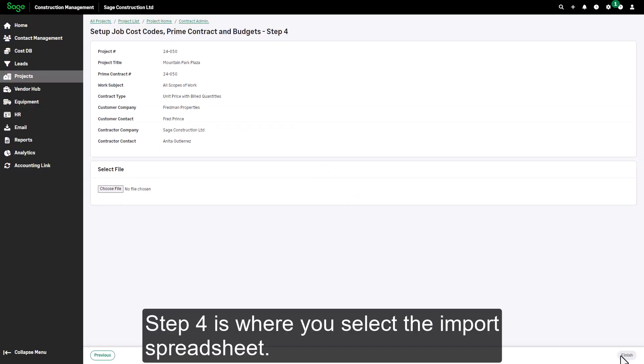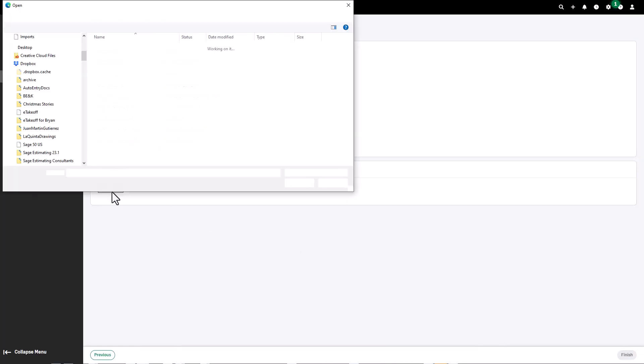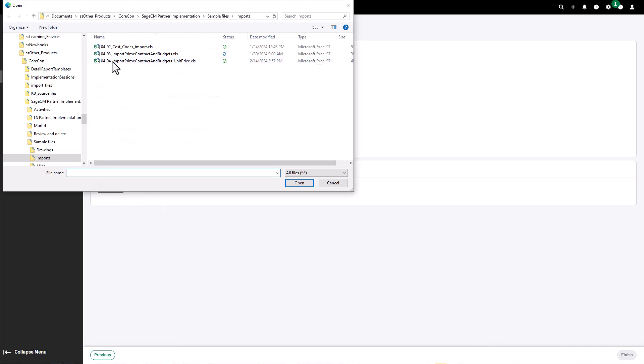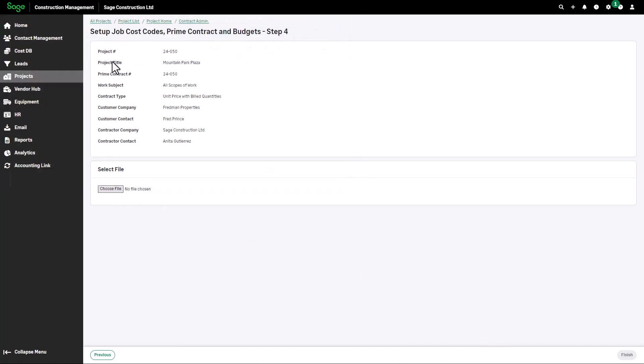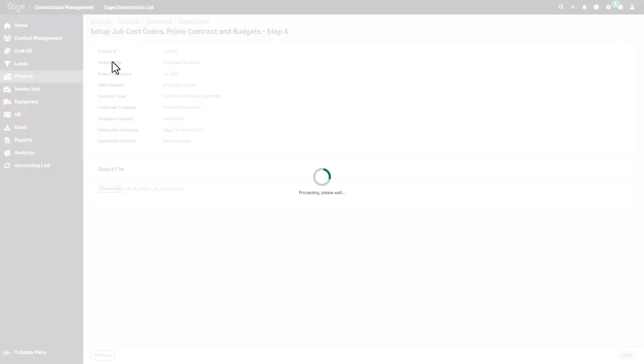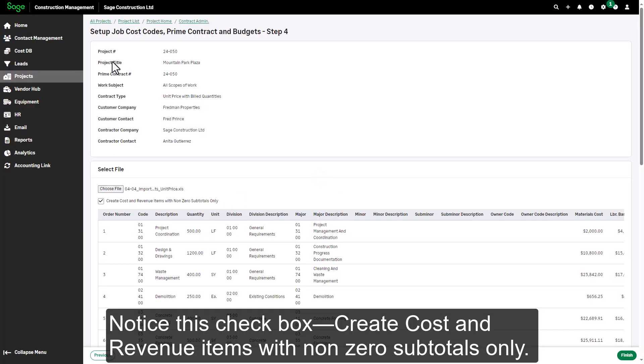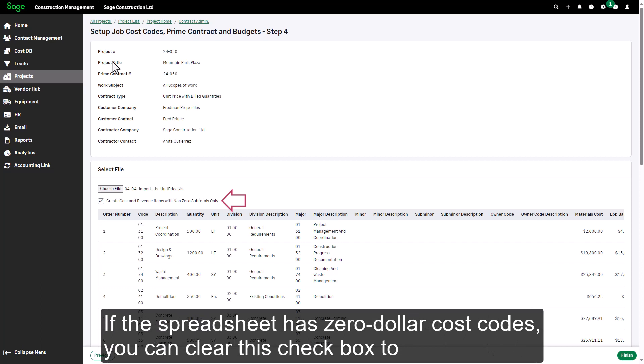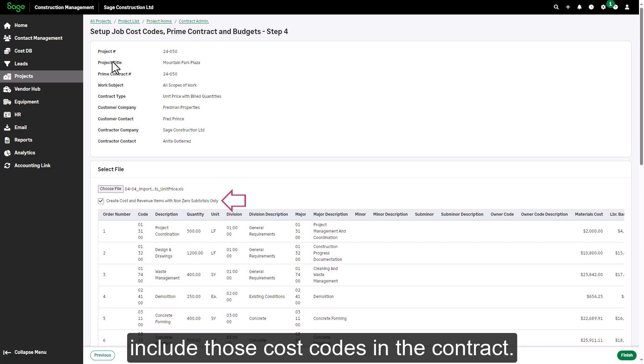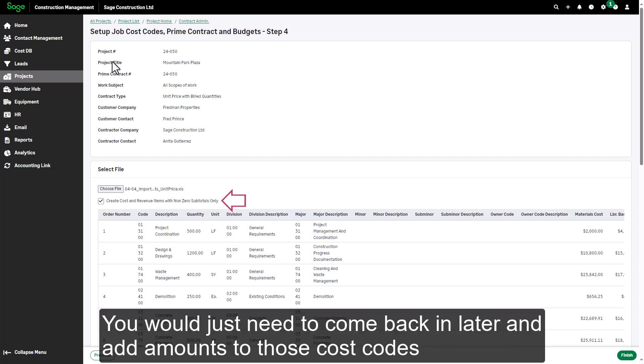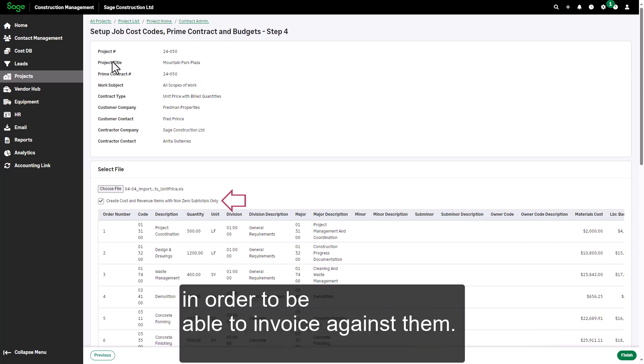Step four is where you select the import spreadsheet. Notice this checkbox, create cost and revenue items with non-zero subtotals only. If the spreadsheet has zero dollar cost codes, you can clear this checkbox to include those cost codes in the contract. You would just need to come back in later and add amounts to those cost codes in order to be able to invoice against them.